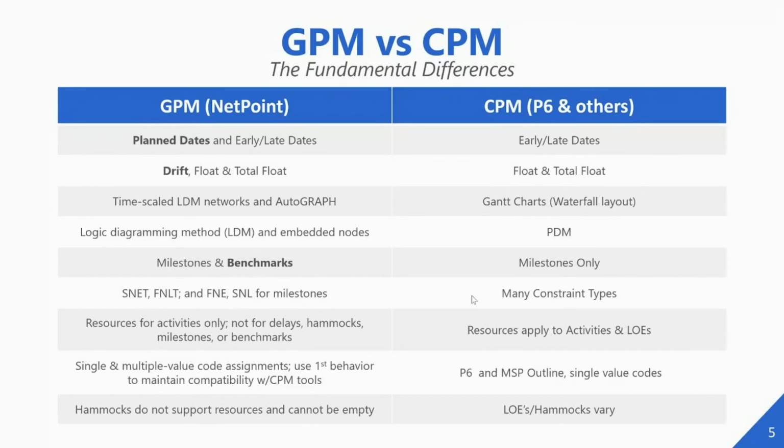On the P6 side, P6 does not support multiple value code assignments. So if you have any multiple value code assignments in your NetPoint schedules, they are not exported out to the XER file. Also, NetPoint supports delays and P6 does not, so those are converted to activities.